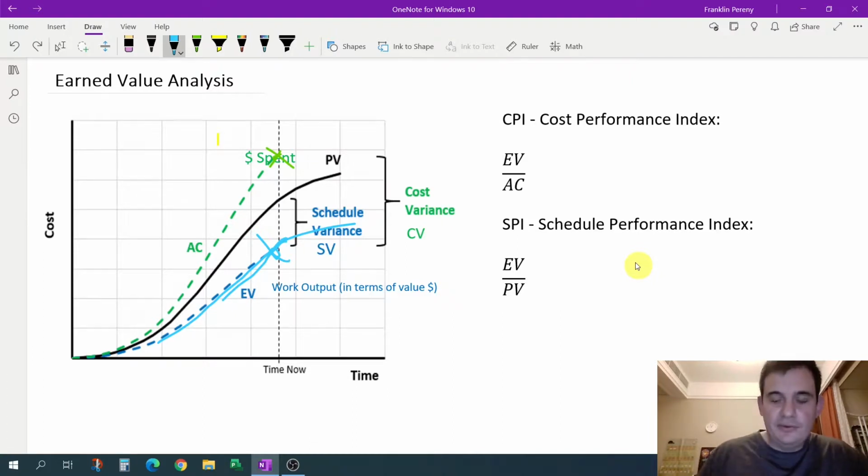But it's also a useful tool to calculate the future, which is why you use these to calculate the estimate at complete and the estimate to complete. That's one of the methods. Now, if you had a one-time cost, this is just a project management kind of best practice. If you had a one-time blip because there was like a special case, you may say, you know what, the CPI doesn't make sense.